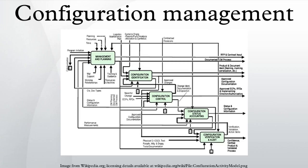The traditional software configuration management process is looked upon by practitioners as the best solution to handling changes in software projects. It identifies the functional and physical attributes of software at various points in time and performs systematic control of changes to the identified attributes for the purpose of maintaining software integrity and traceability throughout the software development lifecycle. The SCM process further defines the need to trace changes and the ability to verify that the final delivered software has all of the planned enhancements that are supposed to be included in the release. It identifies four procedures that must be defined for each software project to ensure that a sound SCM process is implemented.